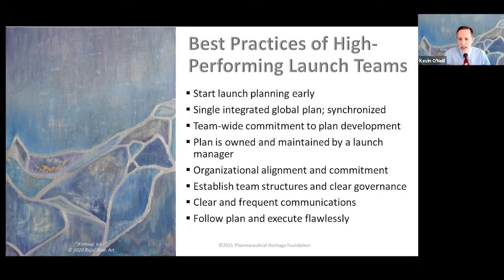Another best practice that we see is that the plan is owned and maintained by a launch manager. Now, nowadays, there are a lot of different tools that are available where various participants on a launch team can manage their own aspect of the plan, and that can work well too. But this practice, I think, is good by having a project manager or a launch leader that is tracking everyone's progress and able to interact with the multidisciplinary team and report back to whoever the global launch leader is on the progress of the launch.